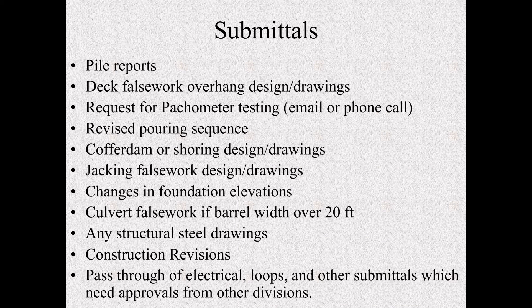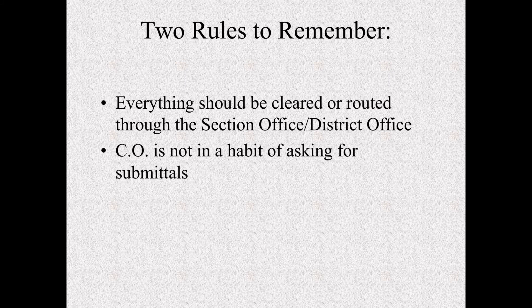There are a lot of submittals that need to get turned in on a bridge job. Just check your specification and check with your engineer. Everything needs to get turned in through the section office first. Look at pile reports, false work, packometer, revised pouring sequence, cofferdam, jacking, change in foundation elevation, any false work structural drawings, revisions and such. These have got to get turned in in a timely manner. If you're not sure if a submittal needs to be turned in, check with your engineer or just ask the contractor for it and they'll tell you whether or not it's going to be needed. These need to get turned in and they need to get recorded. We will go through each of these in later sections, but they're just mentioned here to give you an idea of different things that need to be turned in.